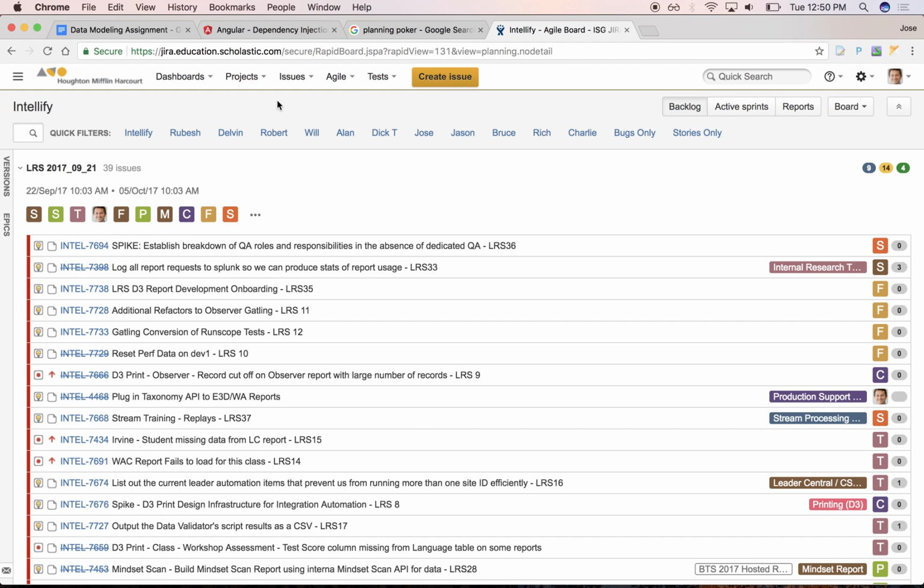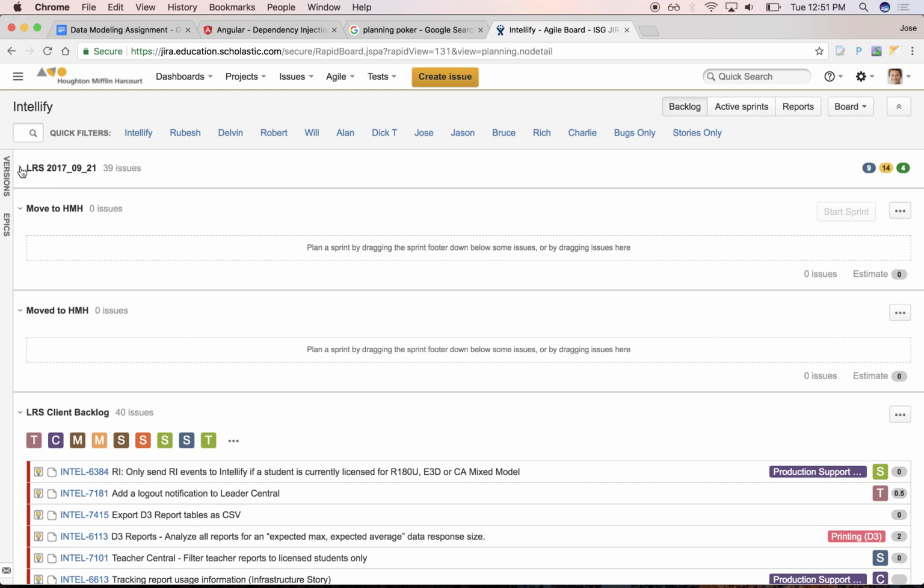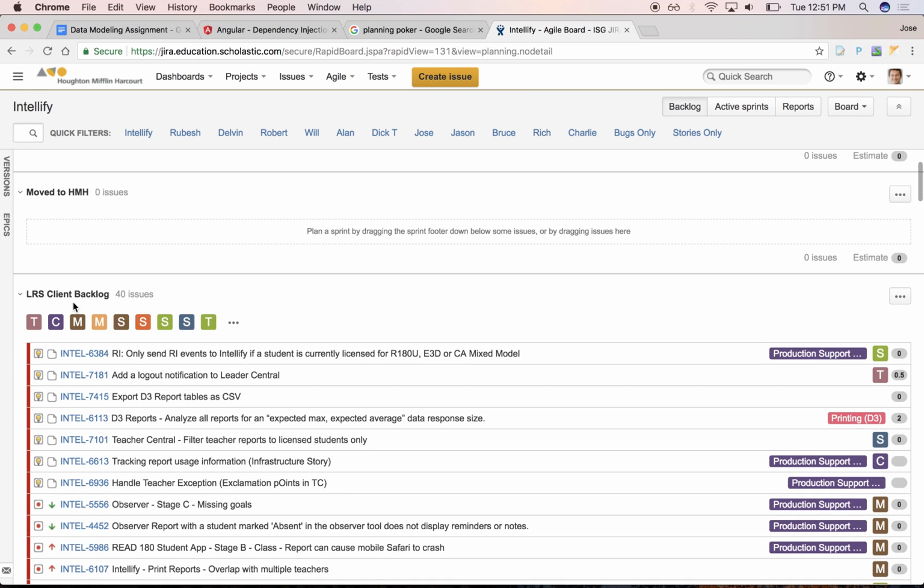It could be that ideally the project manager and the business analyst can meet with certain developers and perhaps split any one of these into many smaller tasks. And here they have organized it into several releases that are targeted for a particular date. So these were the backlog of tasks that we were hoping to meet by the end of September. Whereas we have also broken them down into different filters, right? Those tasks that are targeting work only in the front end, right? So HTML, CSS, JavaScript,